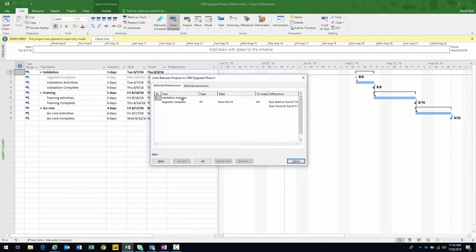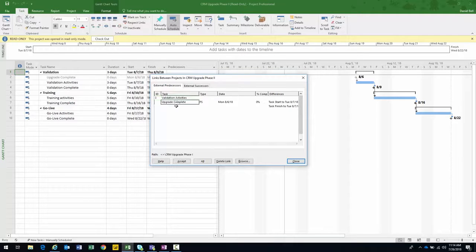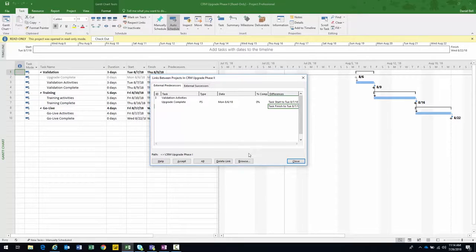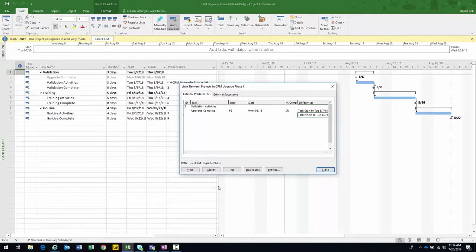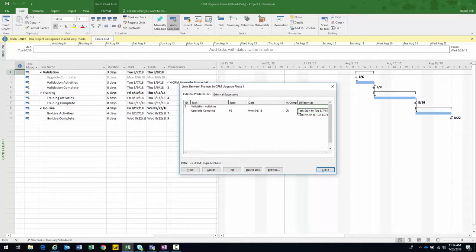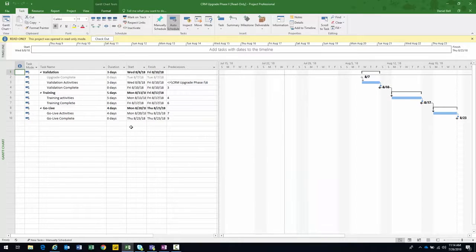A dialogue pops up — this setting was already configured. Basically, this dialogue appears when something is affecting the start date or dates within this project based on an external dependency. It's alerting me that Upgrade Complete was supposed to finish on August 6 but is now scheduled to finish on August 7, which will affect the start date of Phase Two. I have to accept this change and let it update my project. I close the dialogue and immediately the Gantt chart reflects the change.